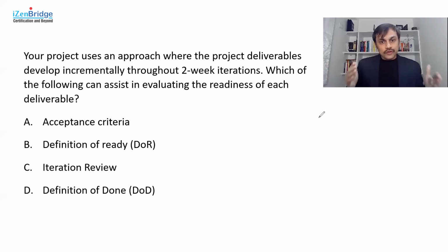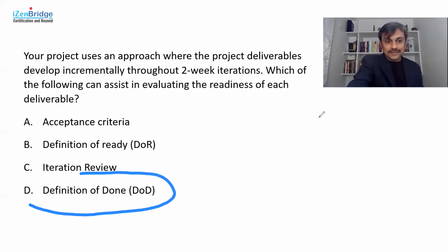And if the team has an agreed definition of done, and they ensure that they are meeting the agreed definition of done for each product backlog item, that can help them in assessing how complete we are. So if we have not met the definition of done, we are not ready on the completeness criteria for that particular product backlog item. And if we are done with the definition of done, we are done with the completeness of that particular item. So we should take definition of done in this particular question as an option. Just to point out, in order to avoid confusion, I'm highlighting this particular option.